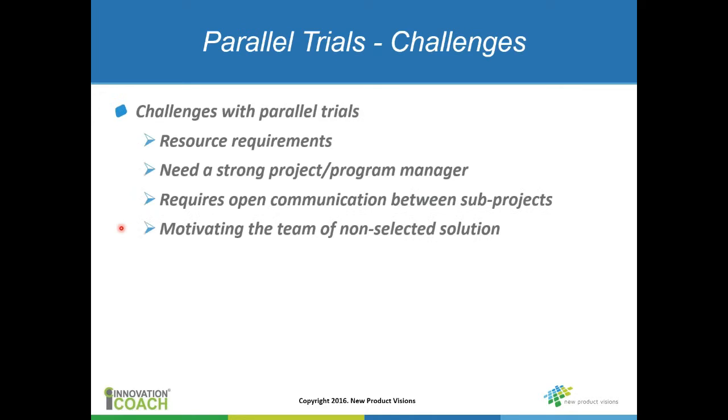Now, there are some really key challenges with this technique. Obviously, it's much more resource intensive, so that's, I think, why you don't see it as much, particularly in small to mid-sized organizations. It relies on a very strong project manager because you've got a lot of moving parts when you're running parallel trials. And again, the project manager has to have open lines of communication across all the teams, and there's more of a motivation effort, because all of the teams except one are not going to be selected as the solution. So you have to be able to motivate the teams of the non-selected solutions.